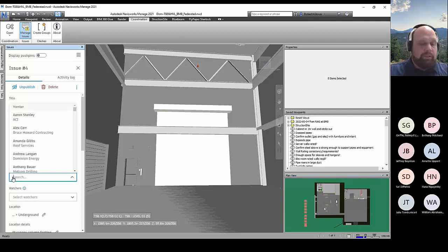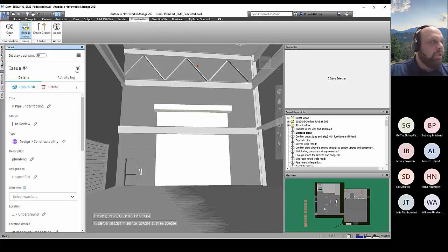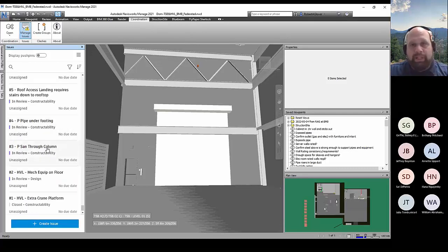So at this point, and I'm not going to do it to this one because I'm on the wrong one, I actually assign this to my lead PE on site, who's then going to have a conversation with the design team and say, pull this up. I'm probably going to be part of that conversation too. We're going to say, hey, is this intended? No? Okay, great. We're going to push this to an RFI. Nine times out of ten, we try to make those RFIs a confirming RFI, where it's like, hey, this is the problem. Our intended solution is to raise this beam up here, put these verticals there, problem solved. Please confirm this is acceptable. To the greatest extent possible, we try to do that.